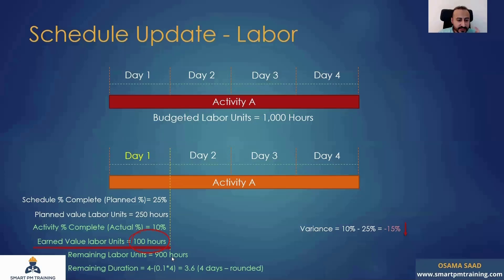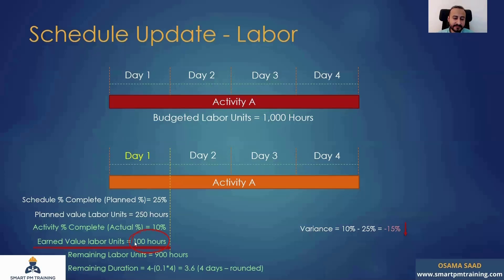Maybe you have 1,000 hours actually spent, but you're getting back 100 hours worth of progress. If you're spending 200 actual hours on site, it means that for each two hours actually spent with wages and laborers, you're getting back one hour worth of money and progress. That's another way to explain the earned value labor units concept.